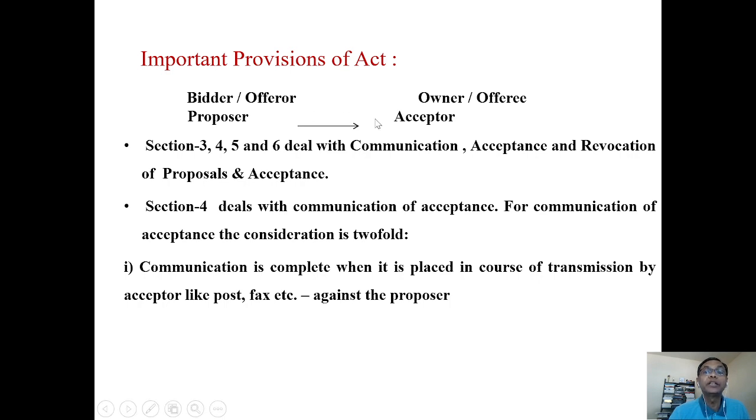Now you may ask, can it be revoked? Yes, legally, the Contract Act provides for revocation of a bid, but the consequences are, if the bid conditions stipulate that in case of revocation there will be EMD forfeiture, in that case, the EMD will be forfeited. Otherwise, it is permissible. And an acceptance, once it is given, also can be taken back.